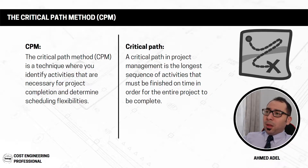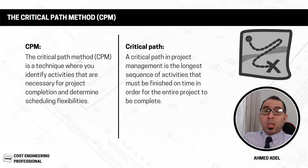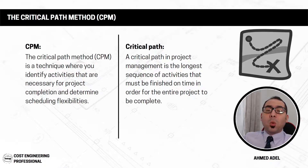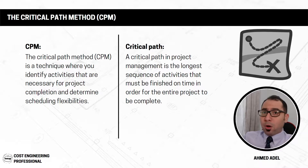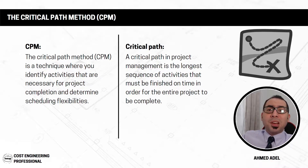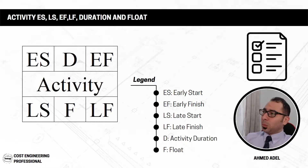The critical path in a project is the longest sequence of activities that must be finished on time in order for the entire project to be completed on time. It's a sequence where if any activity is delayed by one day, the project completion is delayed by one day as well. These are the critical activities — they cannot be delayed by even one second without delaying the project.